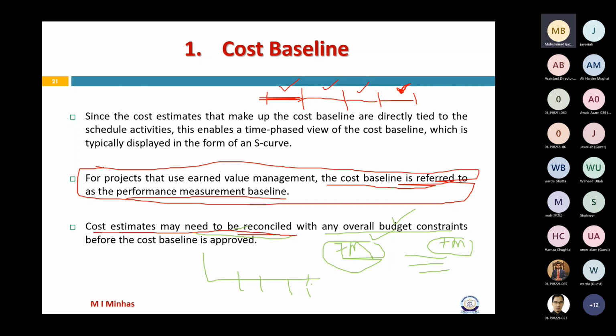The schedule will move forward, and because of that it is quite possible that our project is delayed. Now, you are doing all this during planning. We are trying to establish a baseline, and before the cost baseline is approved, we need to see that our total limit that is given to us in charter and our periodic limit that is given to us in charter, both these conditions should be met. Only then we'll get an approval. Correct? Okay. So now this was all about the baseline.